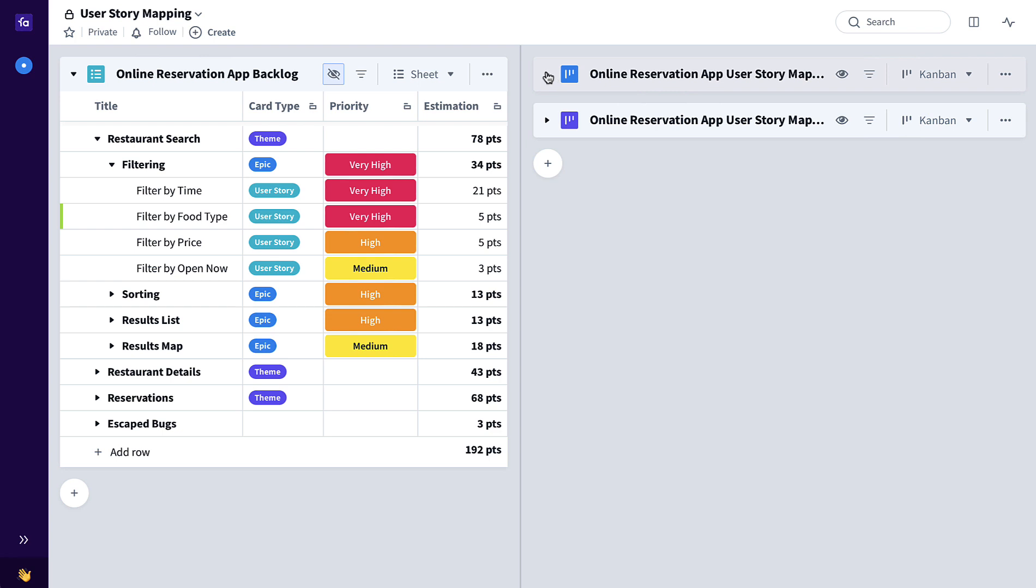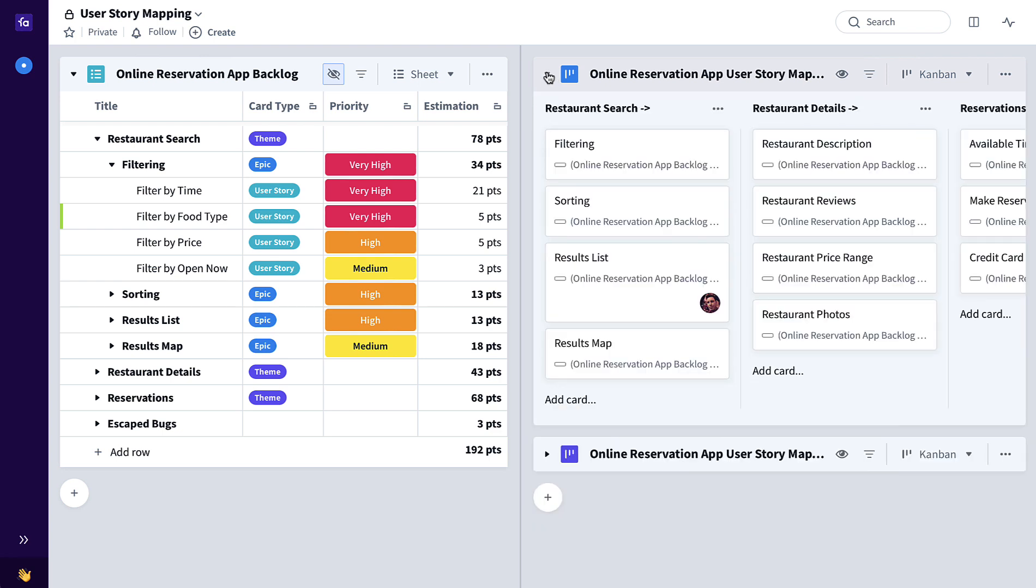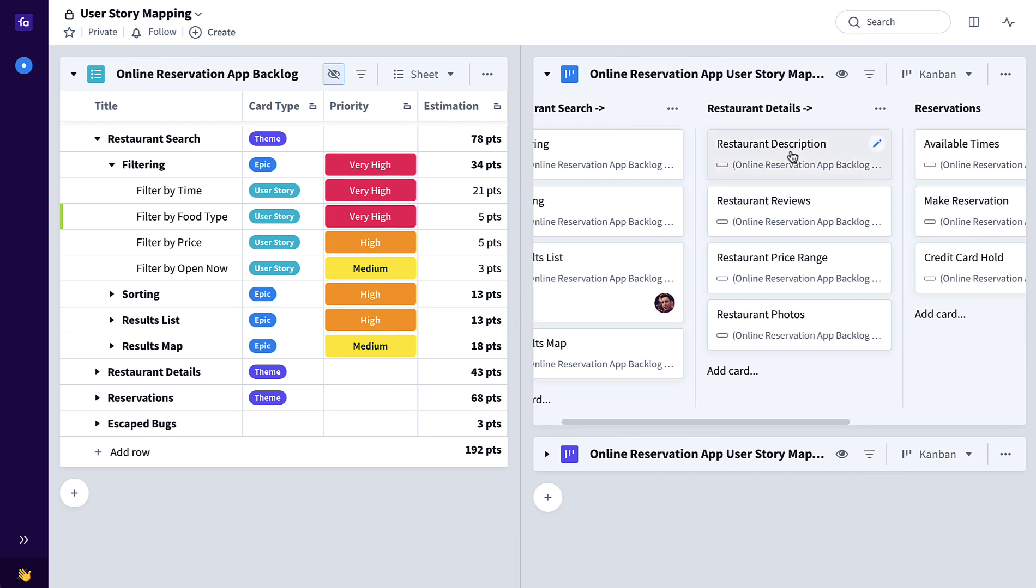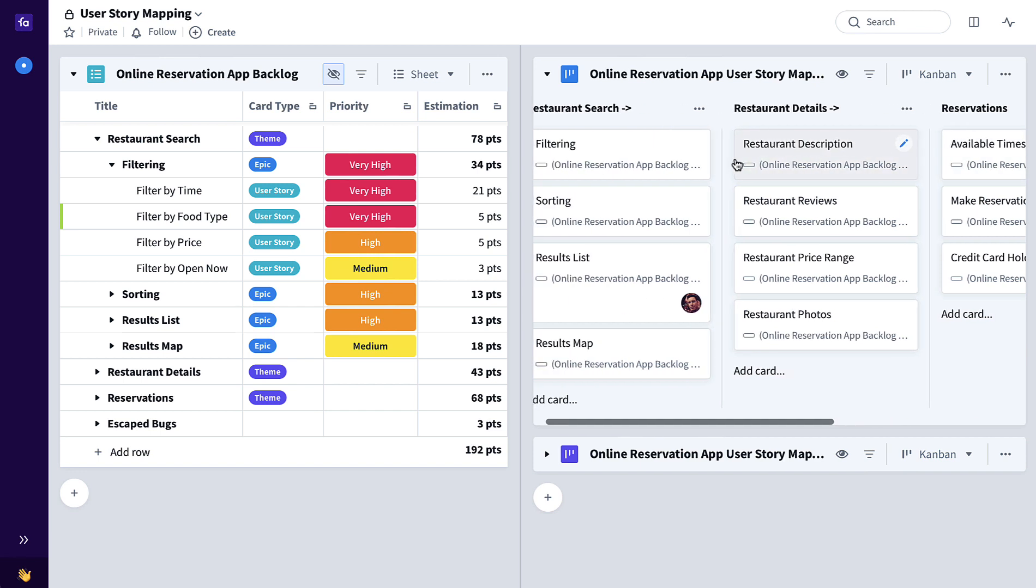Over here on the right we have our first pass user story map where we're mapping through our expected user journey from restaurant search to restaurant details to finally making a reservation at their selected restaurant at the epic level.